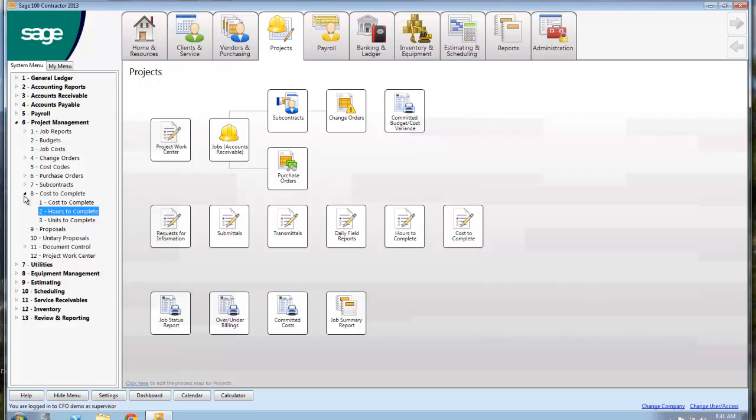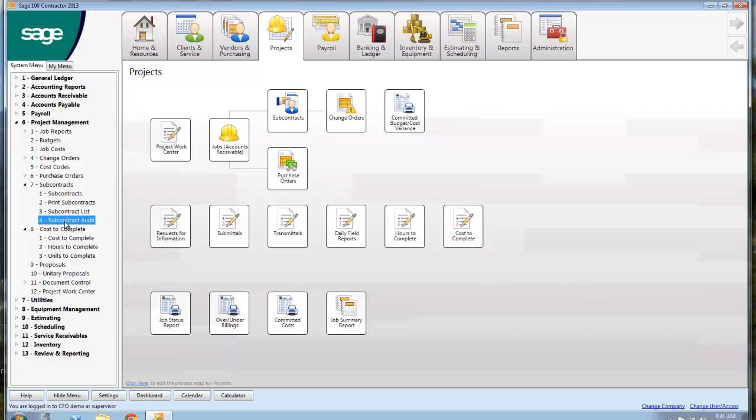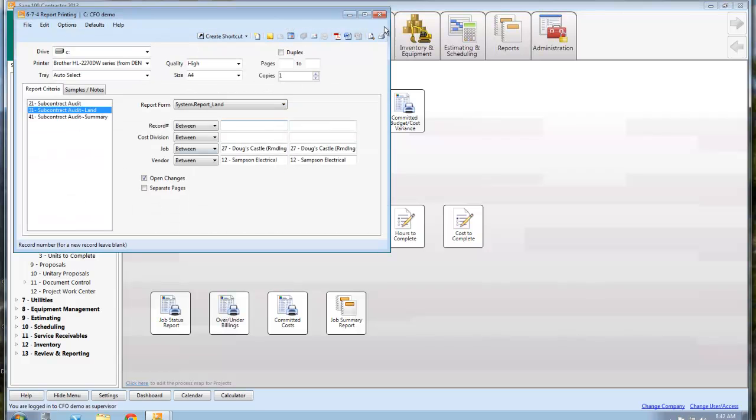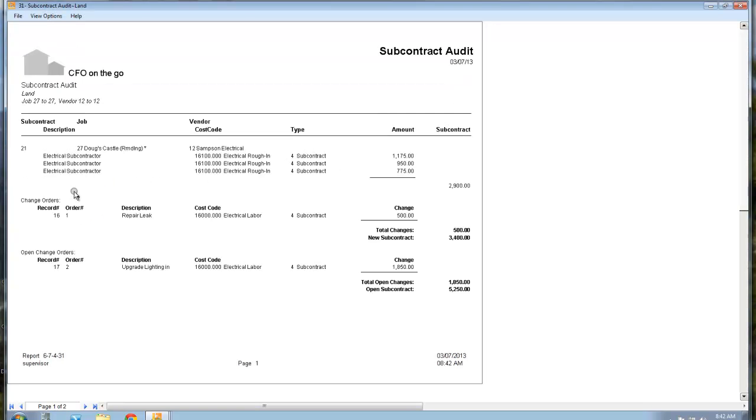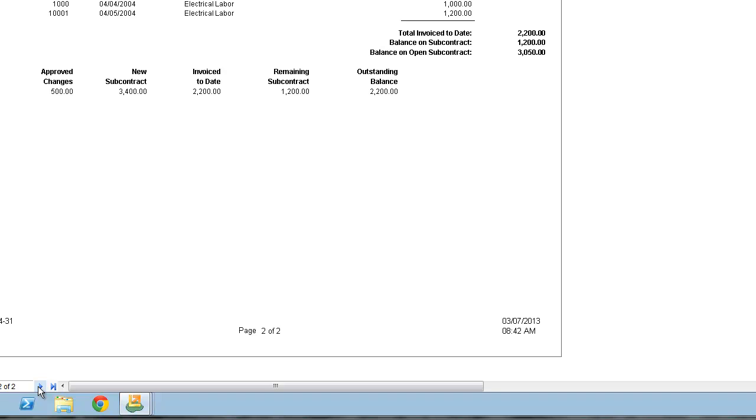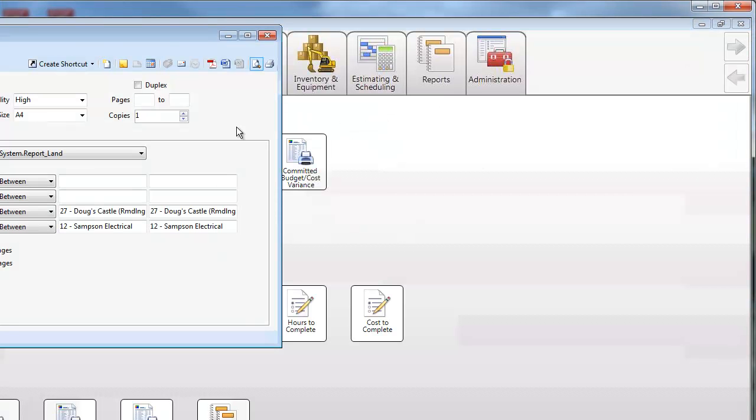So I guess you're probably subbing out rebar and a few other things. So I'll show you one report that should be really helpful for you. So this is what we call our subcontract audit. So this is for one job, job 27, and that's my electrical subcontractor. And the original contract I gave him was for $2,900. Then we both signed change order number one. He signed it, and then we signed it. And so I have change order number one. So his new contract is now $3,400. And I have sent him change order number two for another $1,850, but he hasn't returned it yet. But I know that when he does, he'll have a subcontract value of that. And if I go to the second page, it'll list everything that he's invoiced me for. And then it'll be a summary here. And it also will tell me if there's something in AP, in accounts payable. So I don't have to go around the building looking for information. I know what change orders are back, what change orders are open. I know if the check's been written yet, and I know what he's invoiced me, all from this one report. So that's that.